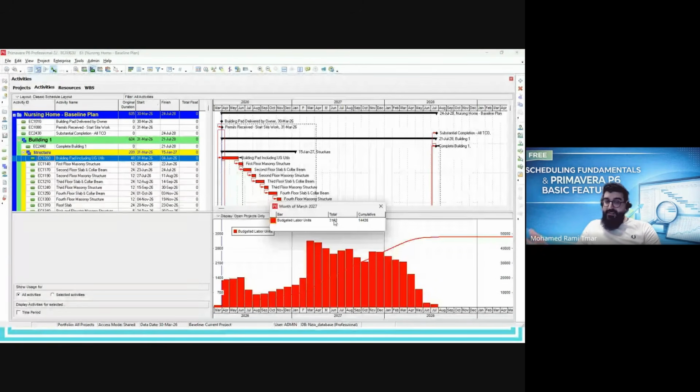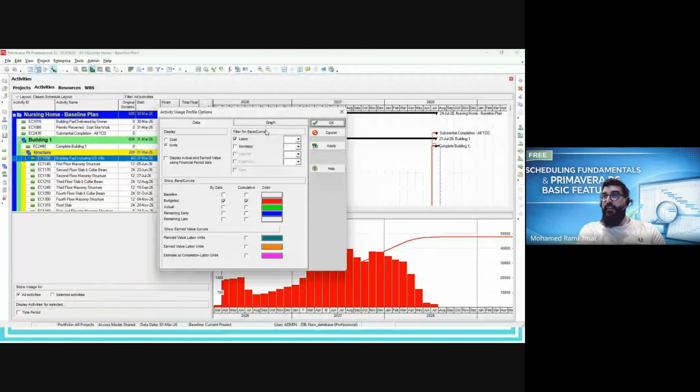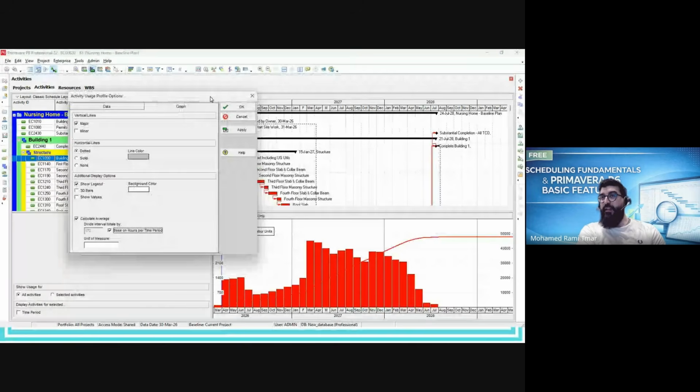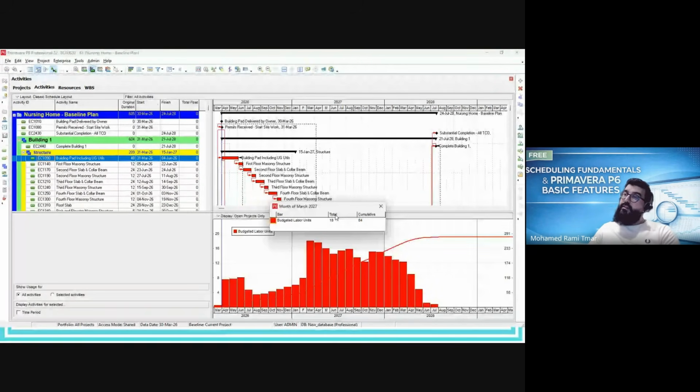So this 3,162 hours is equivalent to how many manpowers, how many persons. Okay, and this is also one of the features in the software. You can clearly and easily split this total hours by the base hours, how many hours per month, for example, if it's monthly, and once it is activated, this total is equivalent to 18 manpowers or 18 full-time equivalent, and it will give you an idea how many persons you need for each month or each week in your project as planned.